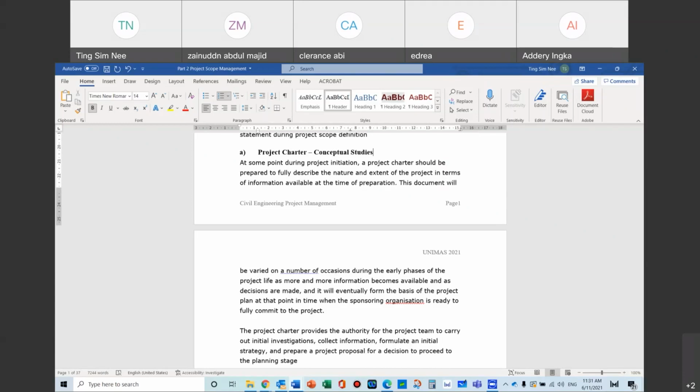Why? Because initially you did not take into account the surrounding radius, a few km radius, of what the populations are like. If it's very condensed already, or very congested, it's not so bad because you already know the numbers that are available. But there are some where you do not anticipate future population, and when the future population comes, your area starts to not have enough water pressure, not enough drainage capacity and all that.